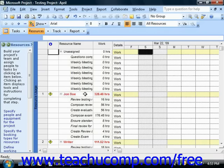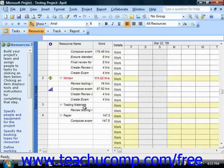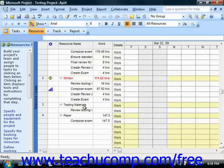Within this view, over-allocated work resources are displayed in red. One way to change resource over-allocation is to manually change the hours assigned to the selected resource, or to add additional work resources to the same task to which the over-allocated resource has been assigned, thereby reducing the hours for the selected resource. Another way to resolve over-allocation is by using Automatic Leveling available in Microsoft Project.